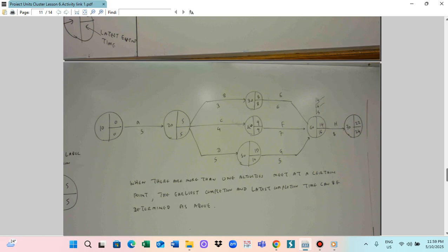And then you can go to activity D. The duration is also 5. So you see the final activities are 50. So 5 plus 5 will be 10. After that, this one ends with activity E. The duration is 6. So 8 plus 6, the final activity will be 14. So this one will be activity 30, and 40, and 60. And similarly, this one goes to the activity of 7, so 9 plus 7 will be 16.